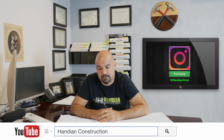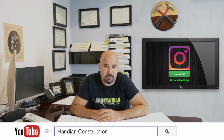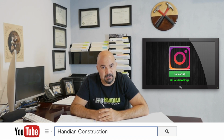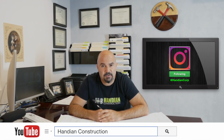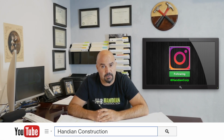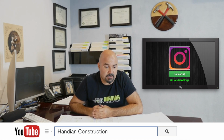That's how our typical process has been: 6 months, which means 3 months in design and getting permits, 3 months in construction. Now I know most people call 3 months 60 days, but it's pretty much the same thing. But you should always keep another month in your head, just in case, for last minute inspections, or sometimes there are things at the job site that the landlord didn't provide, or you never know. This is construction. Things happen all the time. But to minimize it is what we're here for.